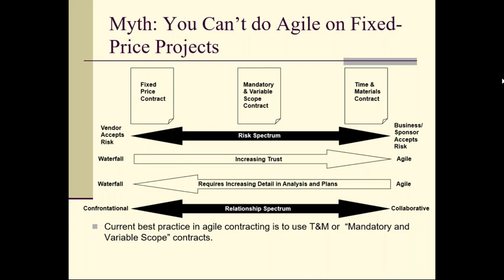The time and materials approach allows you to take advantage of some of that. Yes, some vendors might be higher priced per hour, but they're going to get it done in fewer hours because they have way more experienced teams, right? So working with them, you can see their level of collaboration, the level of quality will be different, and the ability to borrow from prior work that they've done and have some reuse of deliverables and work products will speed things up and make things more stable. So time and materials allows people to work collaboratively and be a little bit more flexible on how they want to do this. And it allows the sponsor to be in control. The sponsor is steering the project.